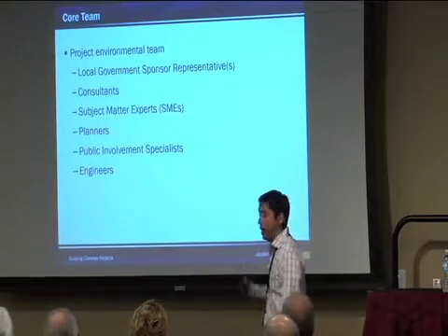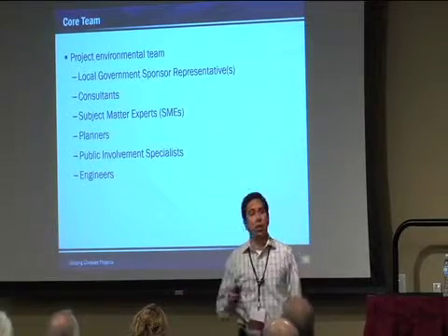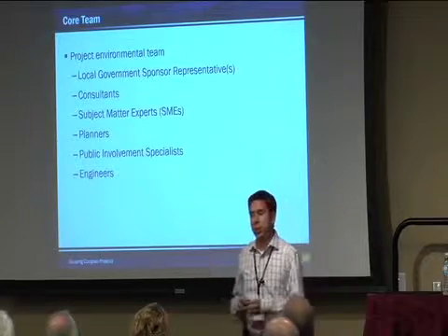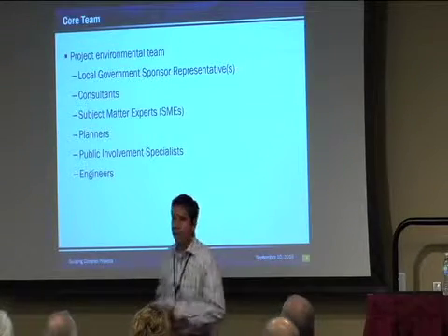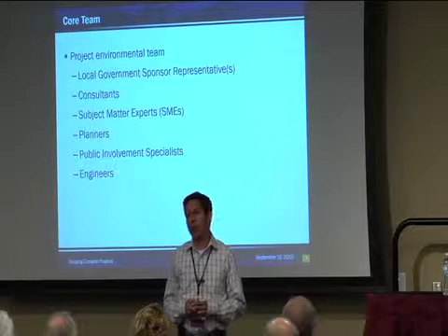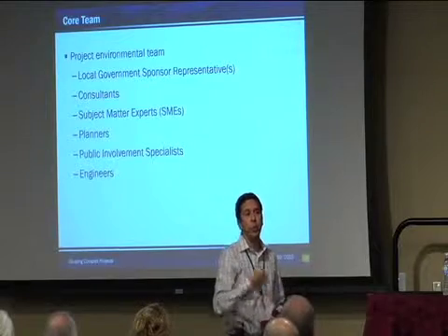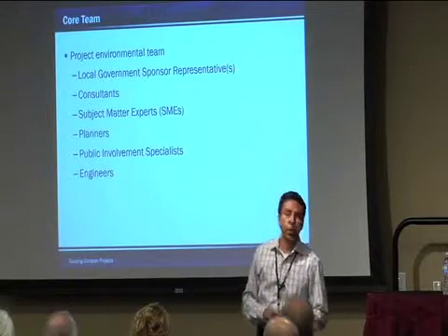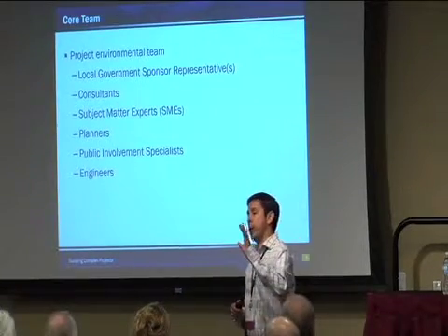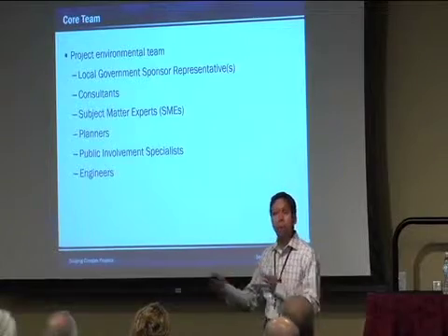And then engineers. Bringing the engineers into the discussion when we have constraints, and one of the examples I'll get into is water. We have some acreage thresholds with permits with the Corps, and by identifying such constraints, we're able to let you know what kind of time frames we're limited to, what kind of constraints you have with regards to acreages and impacts on your footprint, and what kind of time frames we're looking at.